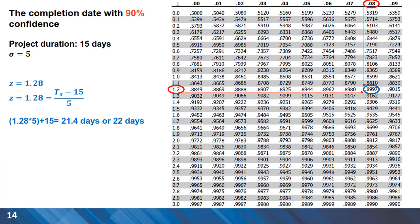Another benefit of the z-score table is to calculate durations associated with a certain probability. In this case, we want to understand what duration we are 90% confident we can finish by. The CPM completion time is 15 days with a standard deviation of 5. We use the z-score formula to calculate the duration for the project, and this is 22 days. We can find this from the formula and the table, and we are 90% sure the project is finished by that time.